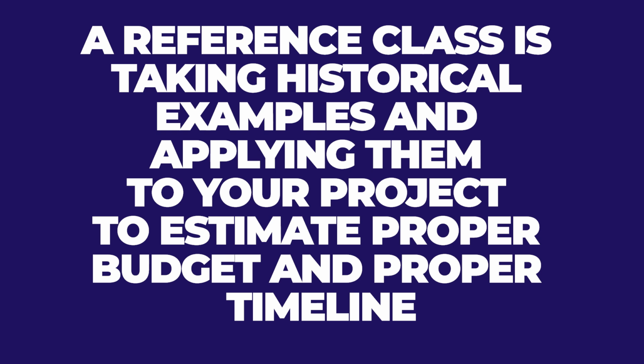All right, so reference class forecasting, what is it? A reference class is gathering data from similar projects or relevant projects that are similar enough to yours to predict success, and this is what you do. Whether you are evaluating the overall budget or the overall duration, or the over-under for the budget or the over-under for the overall schedule, a reference class is taking historical examples and applying them to your project so that you can estimate the proper budget and proper timeline.